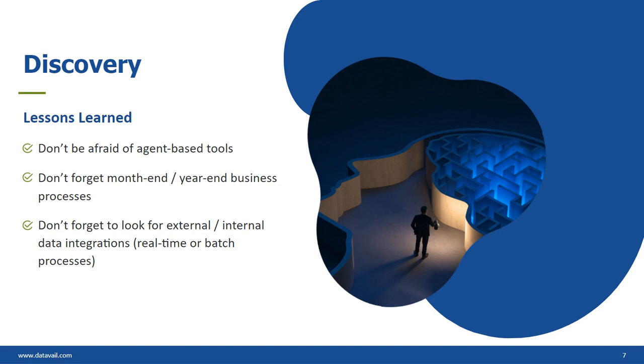So if an HR system needs to send information to a payroll system, which may be separate, in this case you may want to move the HR system and payroll together to the cloud so that the dependency is maintained moving to the cloud.